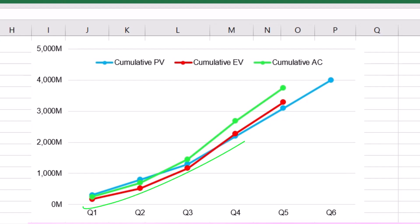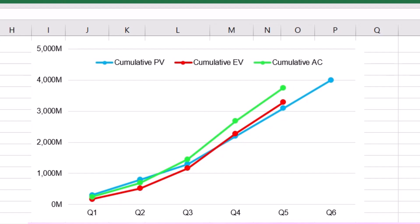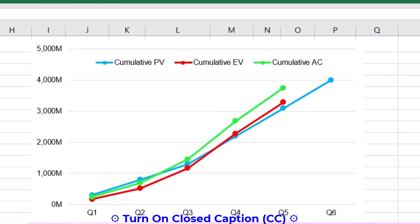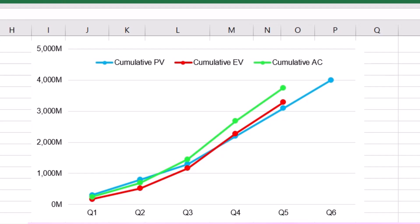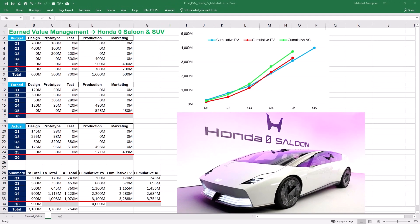On the other hand, actual costs consistently remain higher than the earned value throughout the first five quarters, showing a persistent issue with cost inefficiency. In other words, the project spends more than what is earned from the performed work. Our earned value analysis confirms that the project recovered from early schedule delays but at the expense of escalating costs. The project control and monitoring team must raise concerns about potential budgetary constraints in the later project stages.